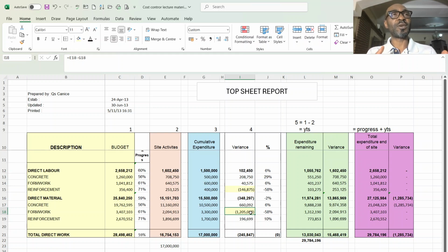And if the contract is a fluctuated contract, it is possible to recoup this money, because what you need to do is present your invoice, and get a publication where maybe the manufacturer has issued a notice that from a certain time plywood will be increased to such an amount. Then you submit all your documents to the client, and the client checks it, and he pays you the differential between your basic rates and what the cost actually is in the market.